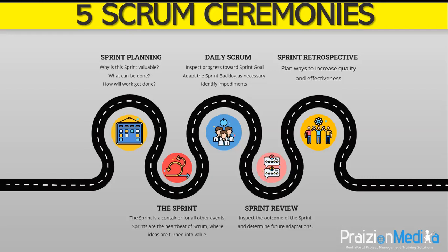So the Scrum team identifies the most helpful changes to improve its effectiveness. The most impactful improvements are addressed as soon as possible. They may even be added to the sprint backlog for the next sprint. Think of these as actions to be taken to give value. It's all about value.